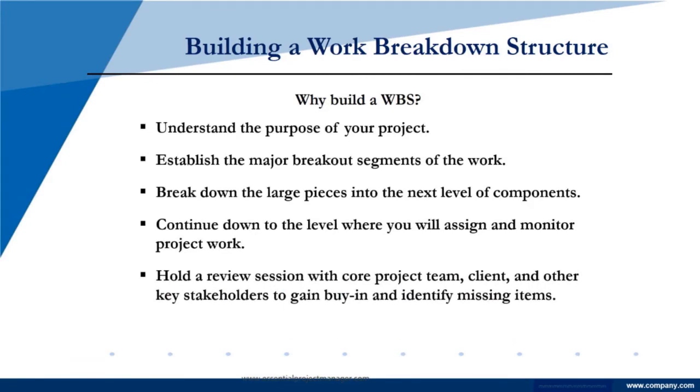You need to get everybody to have buy-in. I won't say that the entire team must do the WBS. I think it tends to work better if a single author puts it together with a vision of how it could be constructed, but then reviews it with the core project team, the client, other key stakeholders, anybody who can make it better.